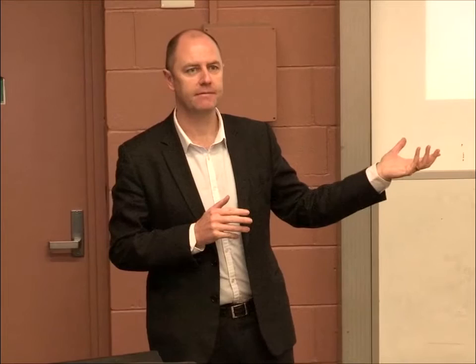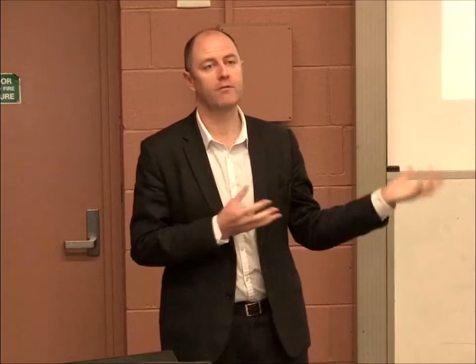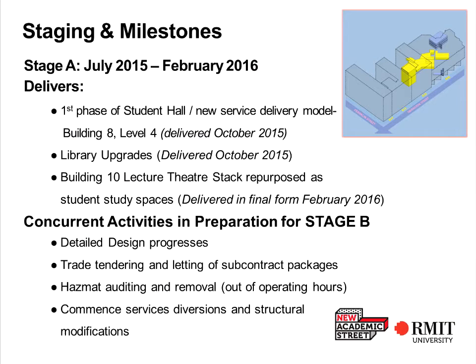We've done a renovation in building 28 also, levels 4, 5 and 6, to allow people to move into that area. Some have already moved in and some are moving in over the next few weeks. Because we'll be shutting down half the library, and I can see my friend Steve Gillespie over in the audience there, we're providing upgrades to the library as we speak to enable the amount of seats that students can use for quiet study space to be pretty much on par with what we have at the moment.